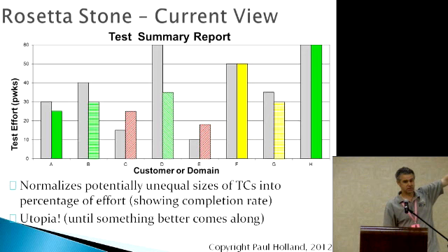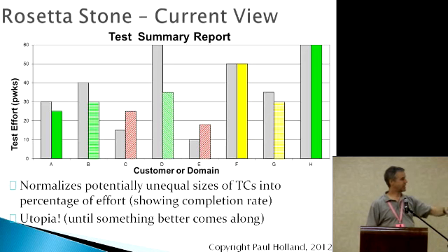So this one here, the first one, customer A, we've completed the work 5 person weeks ahead of schedule. So we have 5 person weeks of plan that we can distribute. If you look over the ones that have horizontal lines, customer B has sideways lines, means we're tracking on plan.